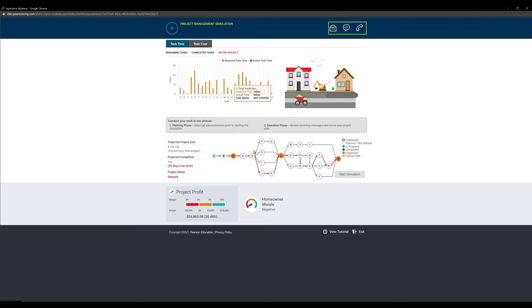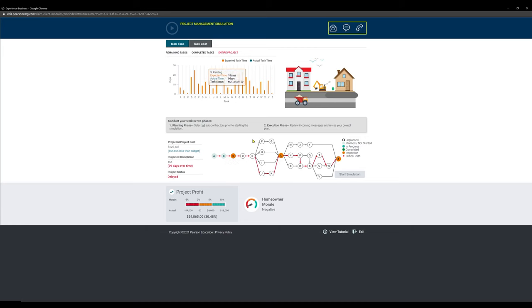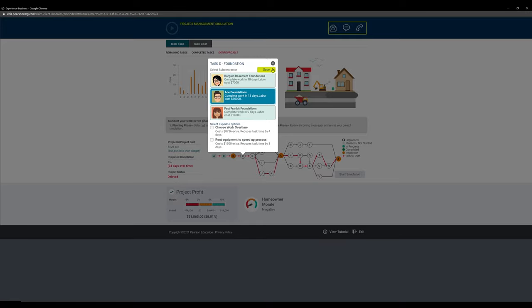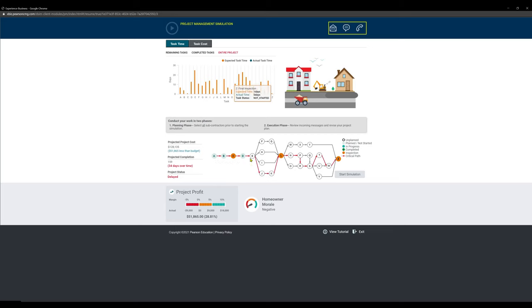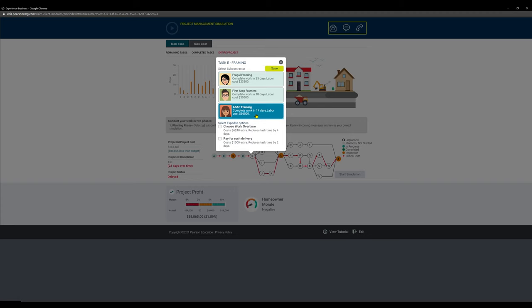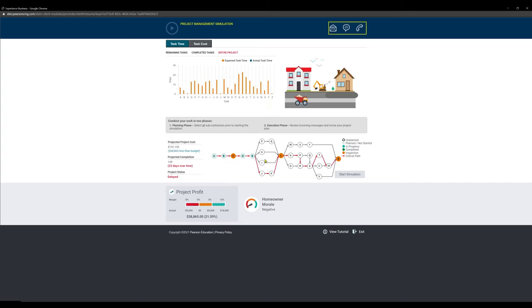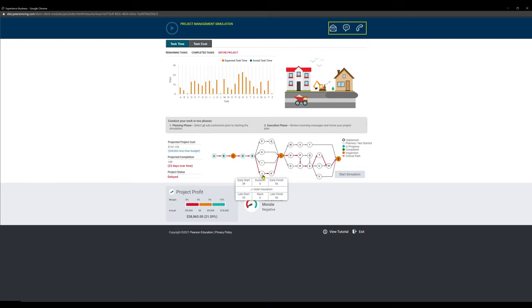Now for E, E is a hypercritical step as it leads into literally the rest of the project. L is an inspection day, that's why it's not super critical, but E is absolutely critical. As a result, E is so critical that we are actually going to pick ASAP farming. We want the lowest number of days, and to go from 25 to 14 is absolutely worth the extra money. So we're going to lower that as much as possible. Now we see our next critical step is in J.